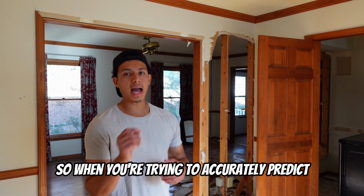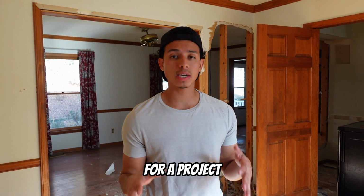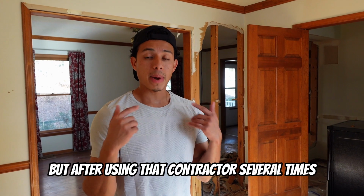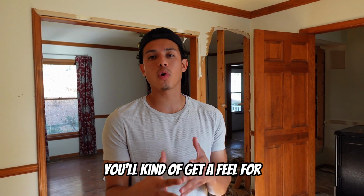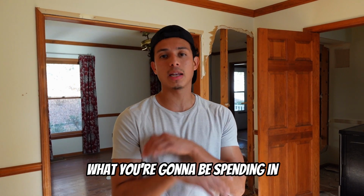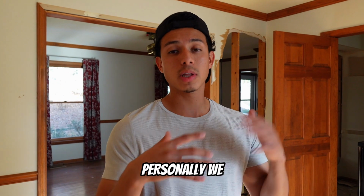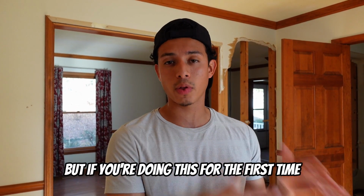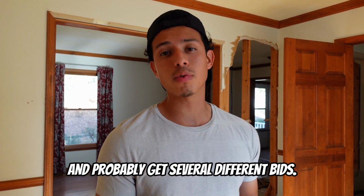So when you're trying to get an accurate number as far as budget and labor for a project, starting off, I would definitely recommend walking it with a contractor. But after using that contractor several times, you'll get a feel for what you're going to be spending in labor and materials for any project. So again, personally, I walk it so I have an understanding of what we're going to spend. But if you're doing this for the first time, you're going to want a contractor to walk it with you and probably get several different bids.